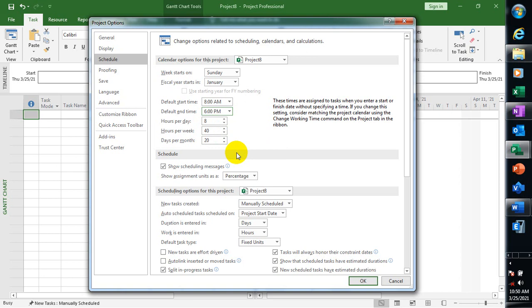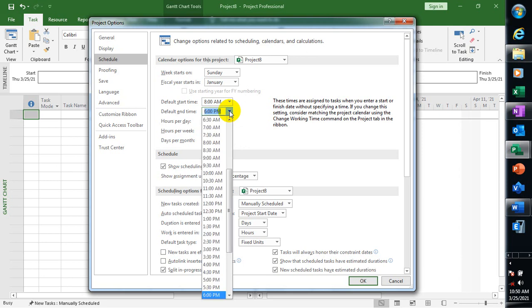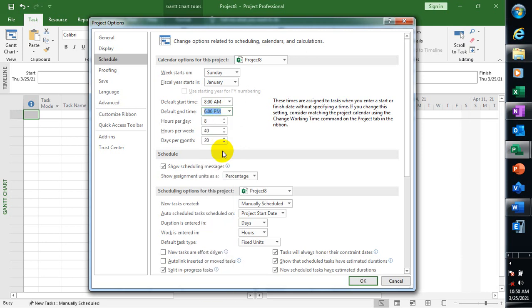So how many days do you work? There are offices, or some sites, that usually work maybe 5 days, from Mondays to Fridays. Some work from Mondays to Saturdays. Usually Sundays are free days on some sites, most especially here in Nigeria. So it depends on the project and how fast you want to meet up with that project. There are some projects where, because of time, you may want to include Sundays, overtime.